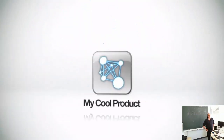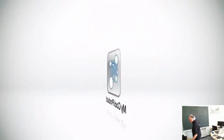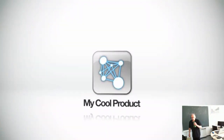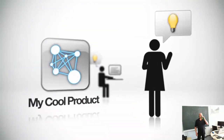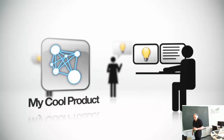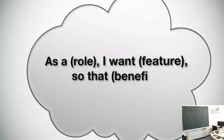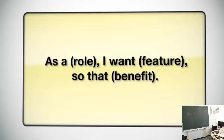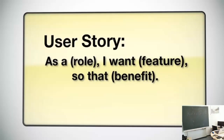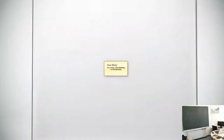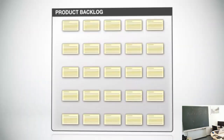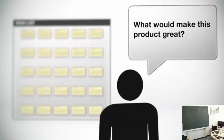Let's say this is the product we want to build. For this product, we get all kinds of feature requests from customers, executives, or even other team members. In Scrum, features are written from the perspective of the end user. Therefore, features are known as user stories. The collection of all these user stories is called the product backlog — think of it as a wish list of all the things that would make this product great.